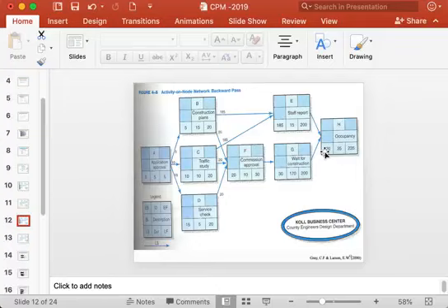In order not to delay the start of activity H beyond 200 days, G must finish latest by 200 days. So that is why latest finish time of activity G is 200.